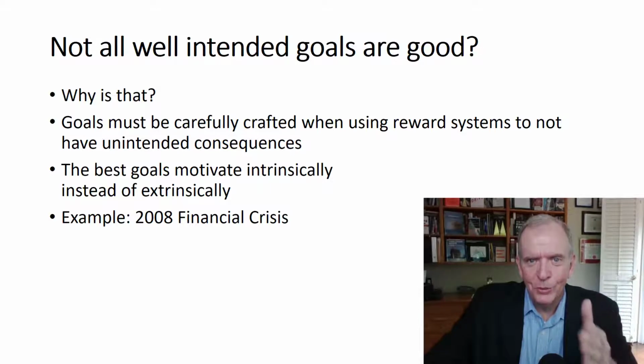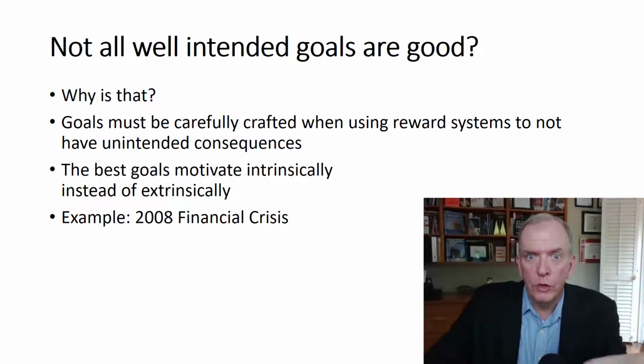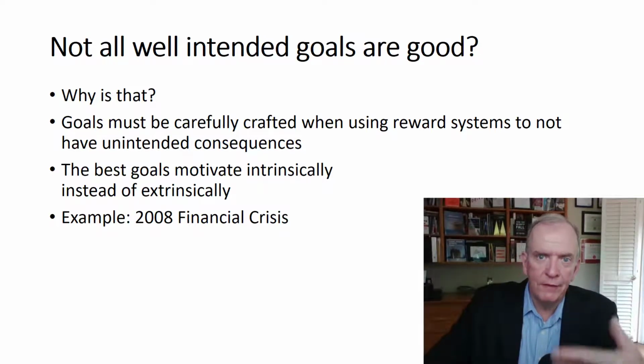Bonuses tied to no late closings. So you got site supers and project managers. They like to get their bonus. You know what? There was no late closings or very few late closings. You know what happened? The warranty issues went through the roof. So they cut corners to get occupancy, and then people moved in, and there were all of these problems with quality, and then they had to be rectified. So the advantage of having no late closings kind of went out the window.